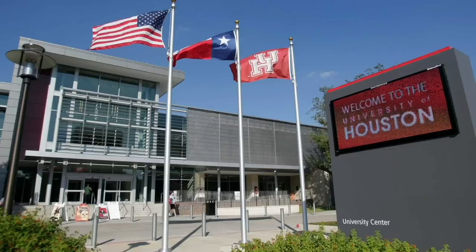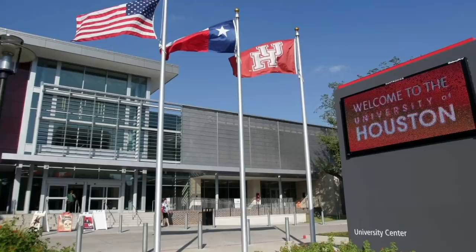We have two future projects coming up. One will be at the University of Houston. We will be providing the same services for Flint Co. General Contractor, along with working in conjunction with East Texas Precast, on the patching, finishing, and grouting for a $50 million parking garage that will be 5 stories, that will be taking place beginning in December and being concluded in August of 2019. Also, there will be another project at Methodist Braeswood, which will be a $35 million parking garage that will begin in December of 2018, that should be completed in around May of 2019. For the Methodist Hospital, we will be working in conjunction with East Texas Precast on that project as a subcontractor.